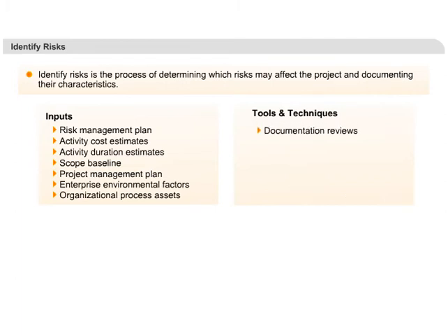One of them is documentation review, and this is a must-do technique for risk identification. This is a structured way to go through the different project documents, like the project management plan, project scope statement, and so on, to look for possible risks. If there are any assumptions listed in these documents, that can be a potential risk. Some organizations have ready-made checklists for risk identification. These checklists are generally a kind of questionnaire that helps in risk identification.